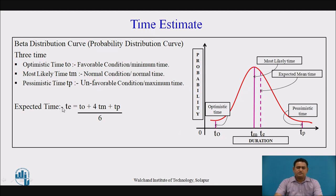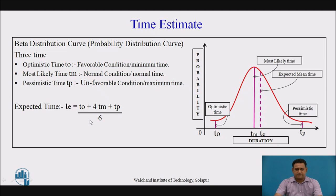The formula used for defining the expected time of each activity is: expected time = (optimistic time + 4 × most likely time + pessimistic time) / 6. This is the beta distribution curve, also known as the probability distribution curve.